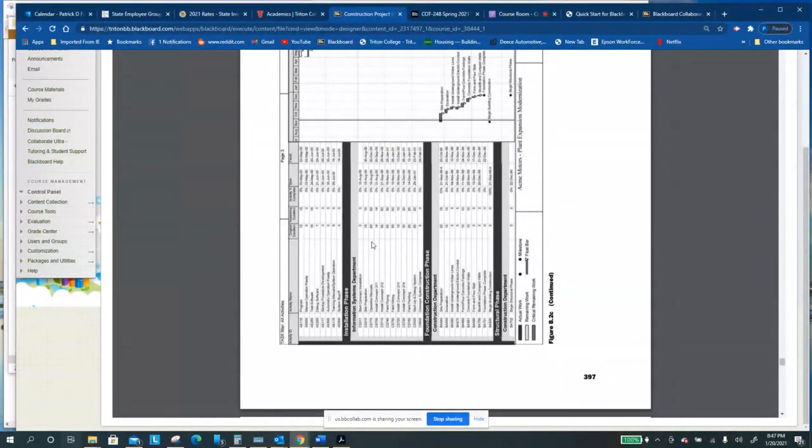Breaking it down, if you're doing the electrical or the plumbing on a job, it's one thing to say, yeah, we'll be on site for 6 weeks. That doesn't give you much opportunity to control and adjust when you just give an overall name to the work. The idea is to break it down task by task and identify how much each of those tasks requires in terms of man hours, labor, that kind of thing.